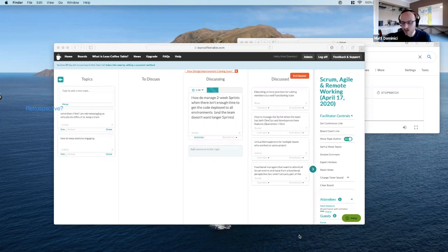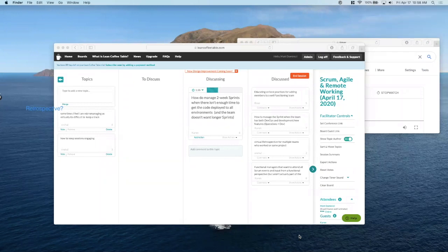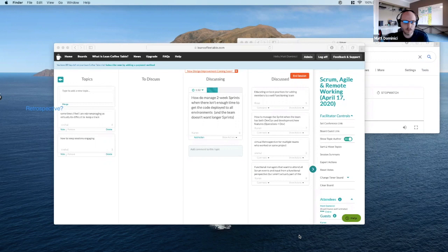We have to take a hard look at how we're doing testing, because if the developers aren't doing testing, or the developers aren't writing good automated tests, it's always going to be this way, right? There's always going to be this lag and this sort of extended lead time to get something deployed. Because when you have a different group that's responsible for quality within the team, what ends up happening is it goes to QA, they test it, they find issues because that's their job, and there are issues. And now you're in this cycle of bug fixing and trying to get things done.